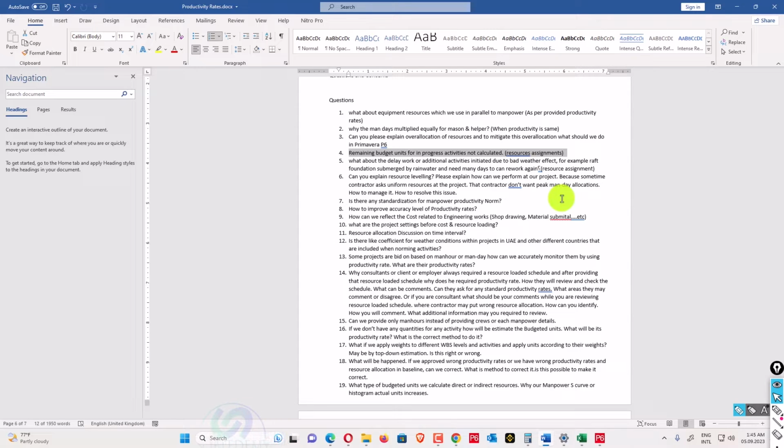So Primavera P6 is basically time based, because whenever your project is assigned, there will be some time frame. If you have been assigned a project, nobody will tell you that you have to consume 20 or 30 man days daily to do that project. No client will say that. They will give you the project on the basis of duration. They will say this is a 1095 days project, including your non-working days, only calendar days.